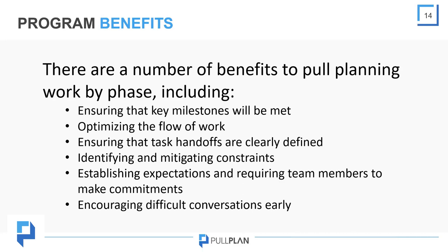Think of it this way. You may have a tiling contractor that is running 2 days late, and your drywall contractor needs to get into the space after them. They show up and mobilize their crew, not realizing that the previous task owner is delayed. That lack of communication can result in poor productivity, as well as claims against the project, which obviously we want to try and avoid.